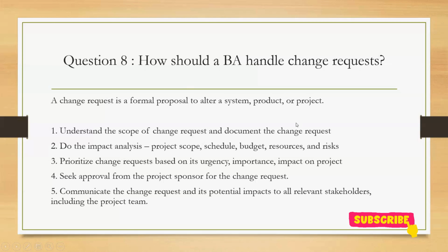It's not like once the change request comes, immediately they will implement it. First, you need to understand the scope of the change request. Then we need to document the change request, guys. Once the change request has been requested, you need to do impact analysis. Is the change which we got within our project scope or not?